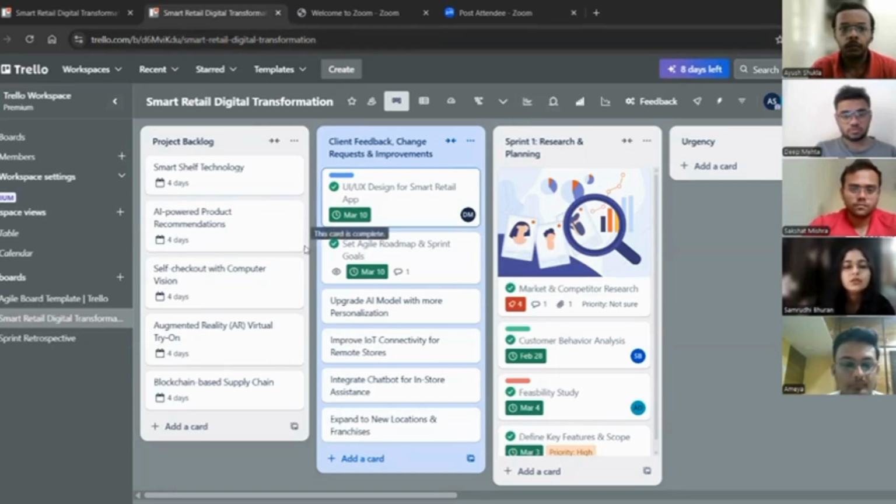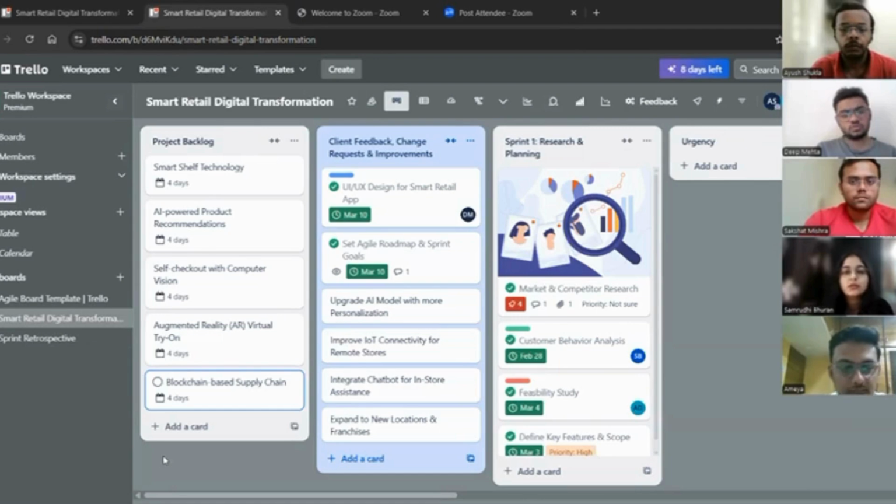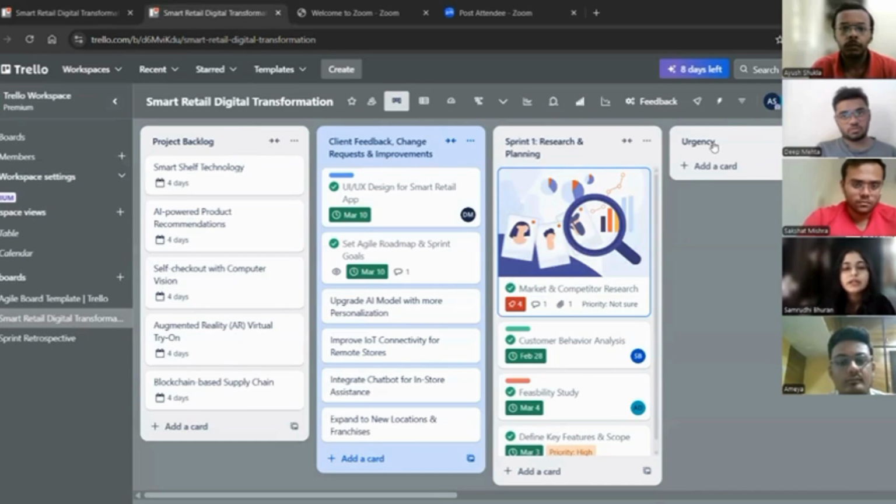So now talking about backlog and work in progress. Understanding the backlog. So let's start with the backlog, a crucial component of Agile project management. It is a to-do list that keeps track of everything that needs to be done. It helps the team stay focused and ensures that work is completed in a structured manner. There are two types of backlogs, product backlog and sprint backlog. So talking about product backlog, this is a master list of all features, improvements, and fixes that the team plans to work on. It's managed by the product owner and constantly updated based on business priorities.